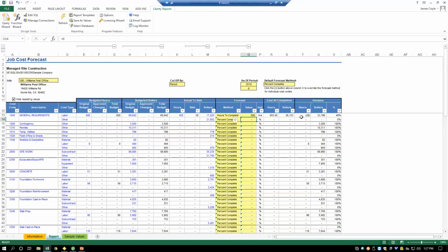Now the work process would be I would complete this, and then normally I would want to follow a process to save this and maybe call it June, and then next month I'm going to refresh that, and the tab would be July, and I would have all my months in a workbook. I'd have visibility of all my forecasts. It's a strategic enhancement to most people that's transformative.